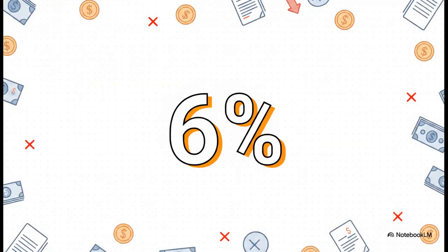And we definitely can't forget about the Section 34 penalty. Under Section 31, you're required to tender payment to interested persons before taking possession. If you fail to pay, or if you fail to deposit the exact compensation amount in the court for a disputed title before taking the land, Section 34 hits you with a mandatory 6% simple interest penalty per annum on the awarded amount. That is a direct, completely avoidable hit to the state's treasury, and you better believe auditors will penalize you for it.